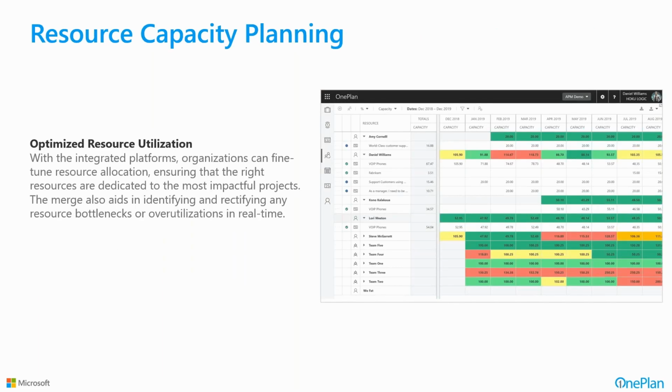And overall resource capacity planning, whether it be more top-down planning, where I'm looking at, hey, I need Jim for half an FTE for 3 months on this project, or from the bottom up, here's the roll-up of all the tasks that Jim's assigned to and the quantification of that, rolling that up to see what we're really demanding of Jim from the detail level. And that can come right from your Smartsheet tasks and the resource assignments you have in them.